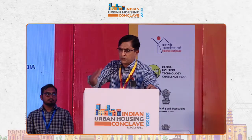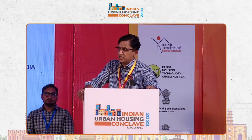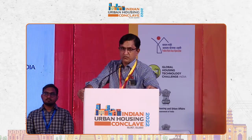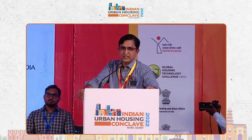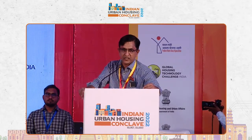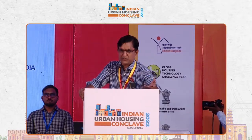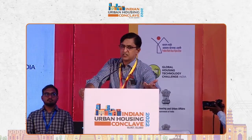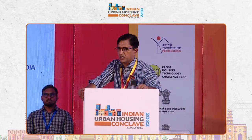Earlier, those of you who are aware of public works would know that when we call the tender, we would decide the technology before we call the tenders, and we prepare the estimate accordingly. Then when the tender is floated in the market, we say it has to be done in such and such way, and we prescribe the drawings. At times, in fact most of the times, we used to issue the structural drawings also, and the contractor just had to execute the work accordingly.